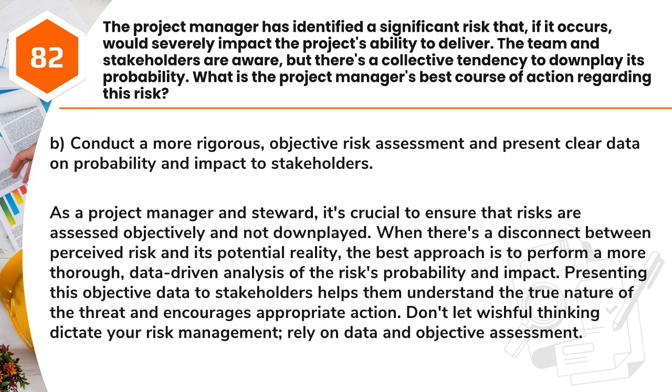Answer: B. Conduct a more rigorous, objective risk assessment and present clear data on probability and impact to stakeholders. As a project manager and steward, it's crucial to ensure that risks are assessed objectively and not downplayed. When there's a disconnect between perceived risk and its potential reality, the best approach is to perform a more thorough, data-driven analysis of the risk's probability and impact. Presenting this objective data to stakeholders helps them understand the true nature of the threat and encourages appropriate action. Don't let wishful thinking dictate your risk management. Rely on data and objective assessment.